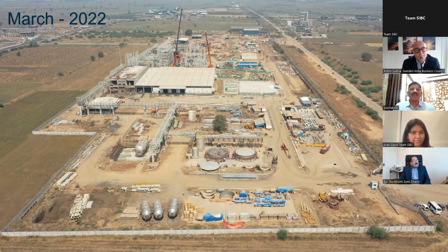And the second thing, we are not allowing people to carry the load on their shoulder or head. The contractor needs to provide a proper rolling system, a carrying system or vehicle, to carry the material from one place to another. And if they want to carry, we specify the weight, and people should not carry more than that weight. And in a similar way, with the civil contractor, because we know that if we can train the civil contractor, all the other contractors coming to any site will follow the first contractor. Okay. So if the first contractor is a failure, whatever they do, all the contractors will follow the same thing.